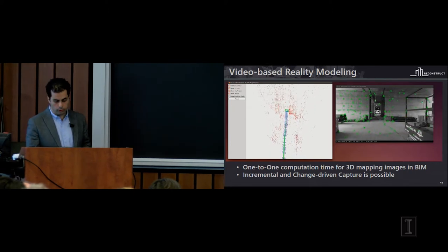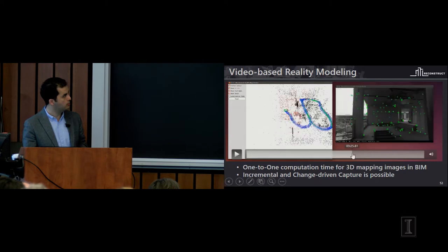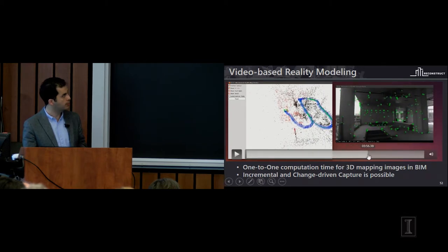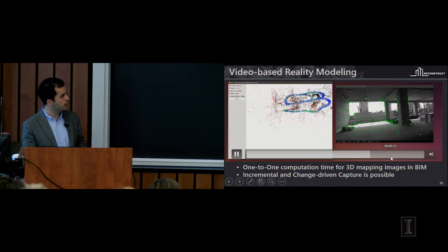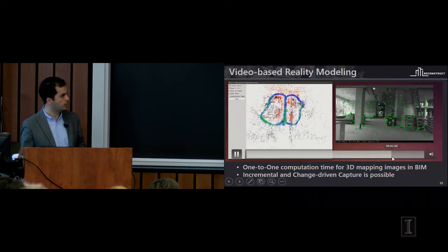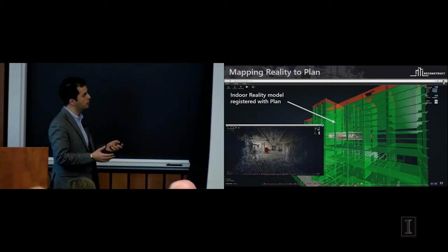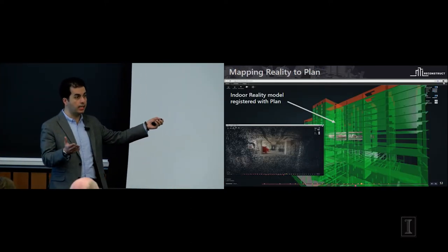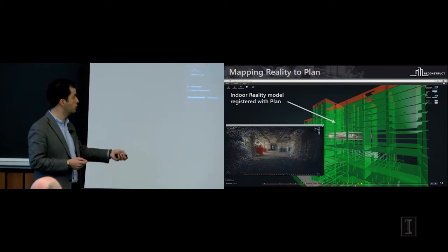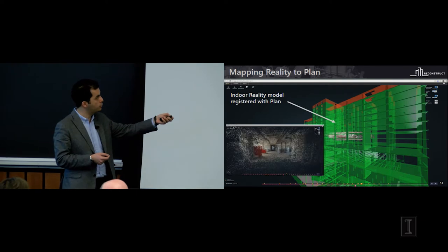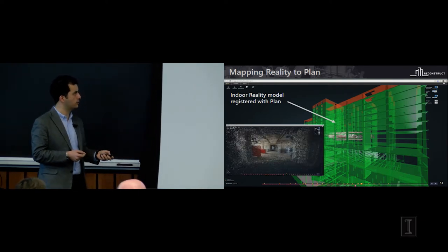So a floor on this building that is somewhere around 100,000 square foot could be captured over a few minutes. I'm going to advance this. So you see the user actually comes back, and we'll be able to close the loop, and we can get a complete capture associated with that location. So now, in a fashion, we've addressed the problem of indoor capture. Now you can start generating the same reality models that I showed you from outside, but this time for inside using a consumer-grade camera, and you can map it into that location on that high-res structure, how much work is actually being done.